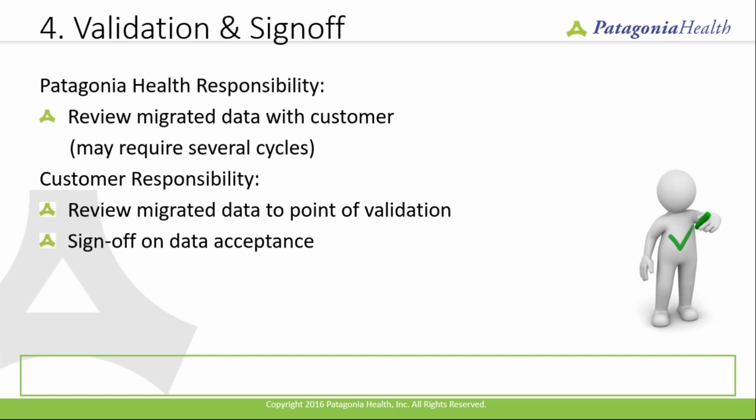That's not unusual for detailed level conversions. So ultimately, the data validation is the process of reviewing the data within the system to make sure that it's correct and complete. The customer is responsible for reviewing migrated data content, validating it, and then signing off.